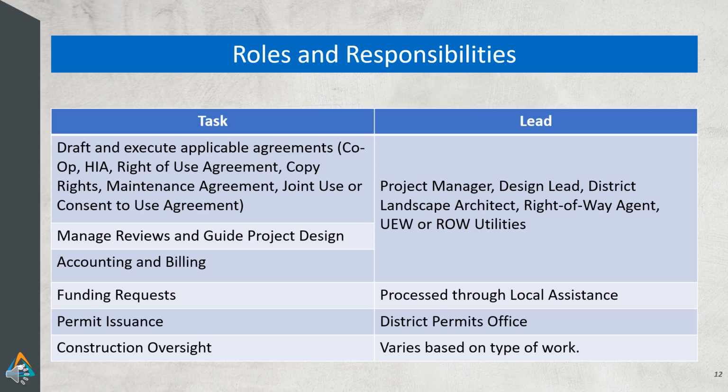Funding requests need to be initiated by local agencies, not Caltrans. They are processed through districts and headquarters local assistance. The task of permit issuance is the responsibility of the District Permits Office.